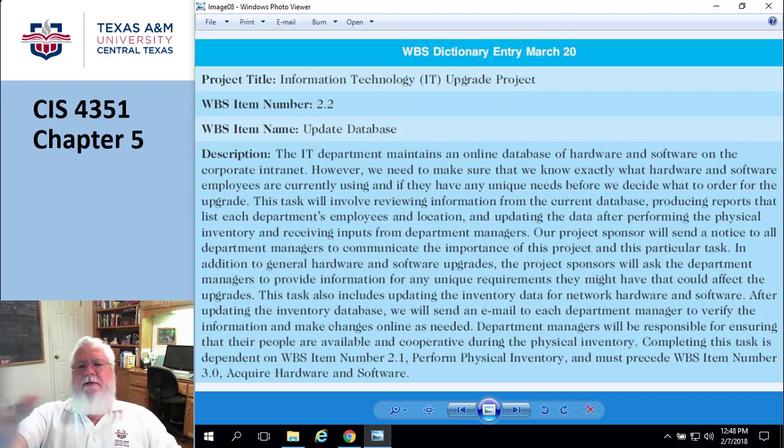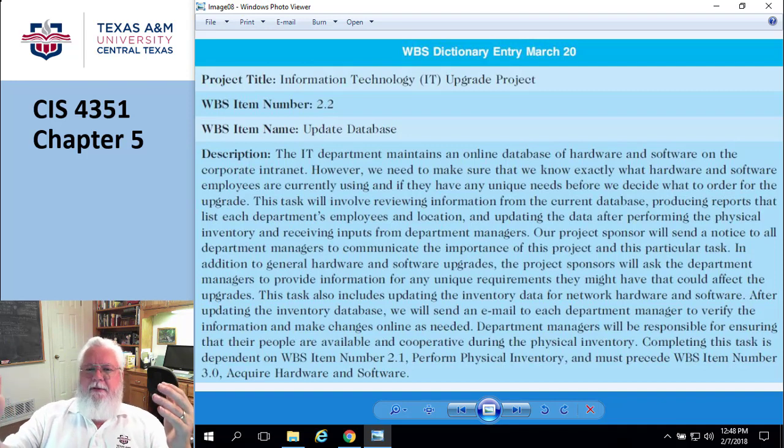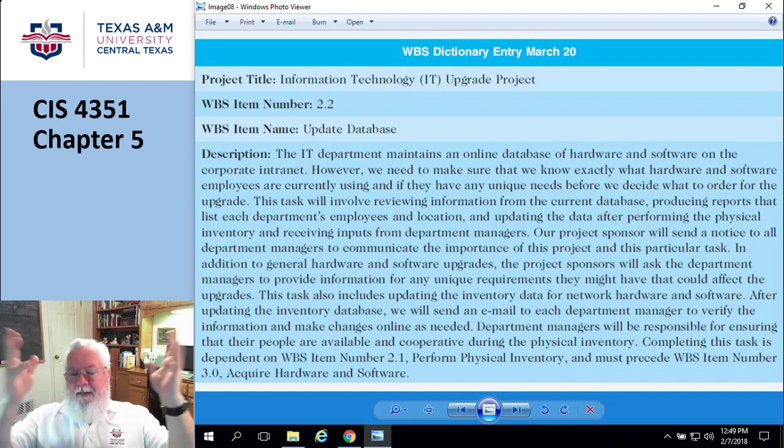You hear umpteen gazillion stories, particularly about government contracts, like weapons systems. It was designed, we were going to get 18 of these, whatever, aircraft carriers, tanks, fighter jets. We're going to get 18, and it's going to cost us $10 billion. Okay, now it's going to cost us $20 billion, and we're going to get 4. Because instead of doing it in a year, it's now going to take 4 years to do. So the scope creep has just gone enormous. They keep adding more things onto it, and the cost just gets higher and higher and higher. That's what we're talking about.